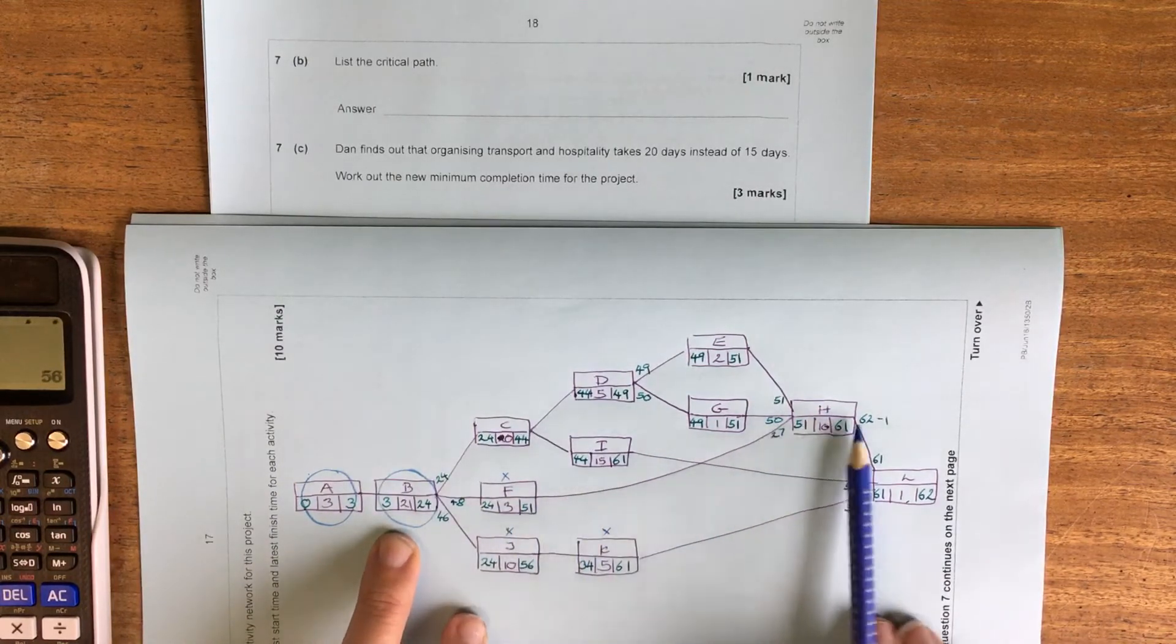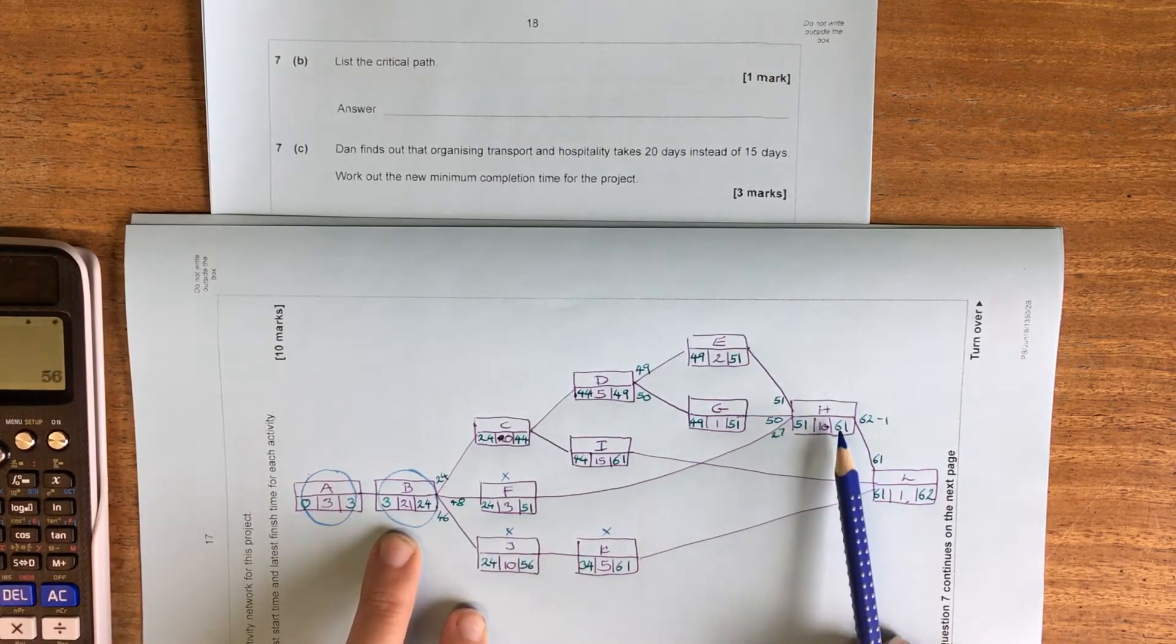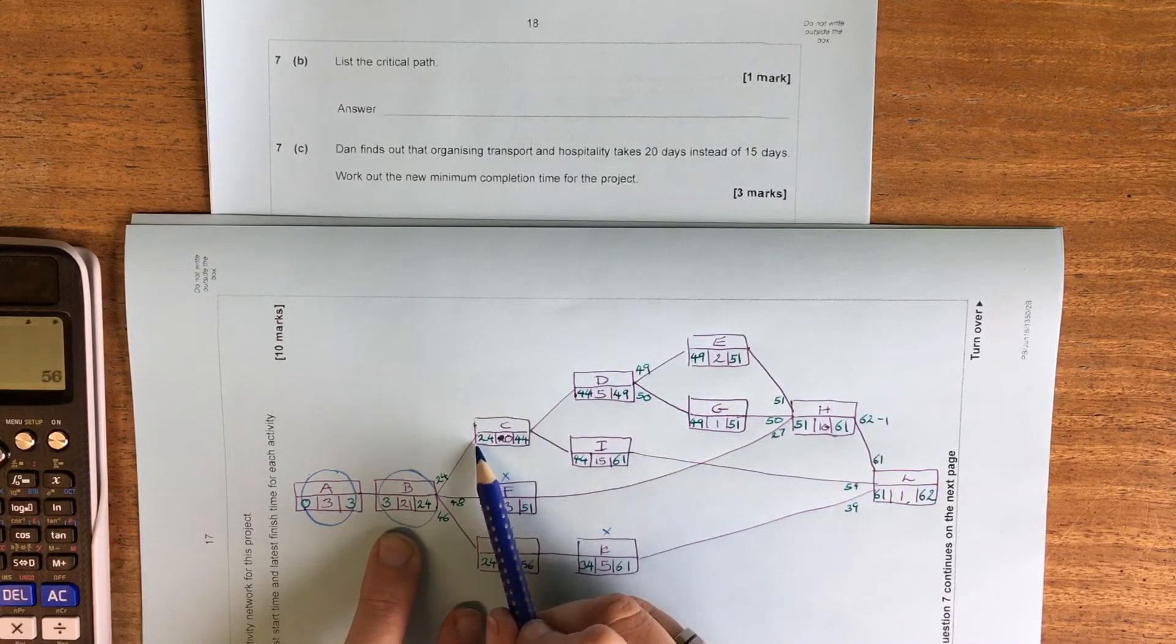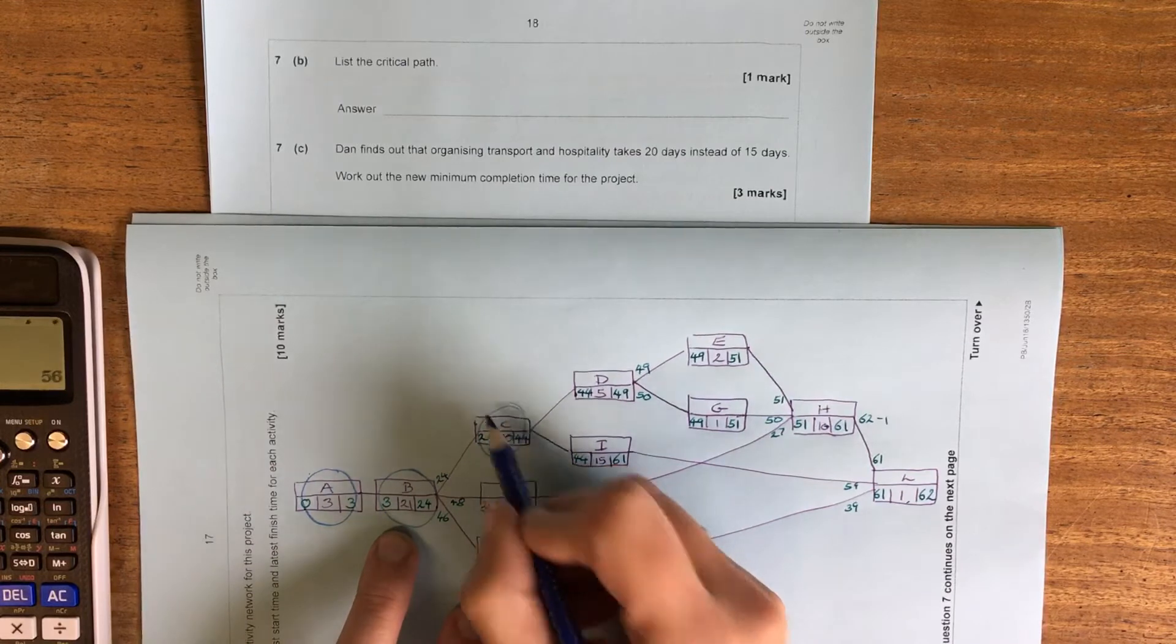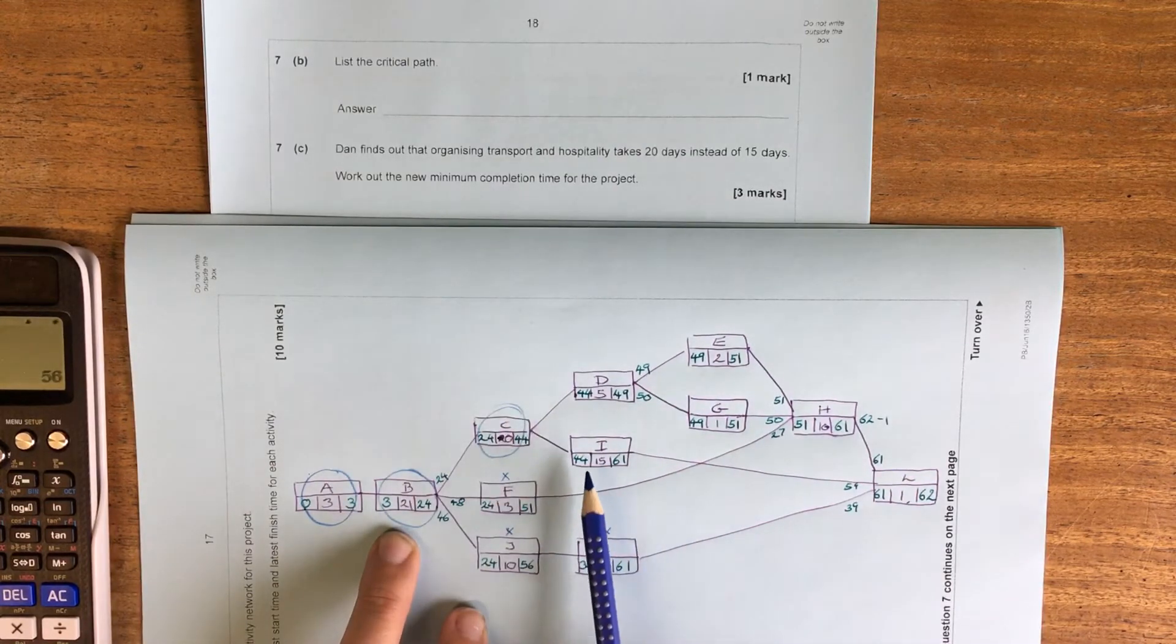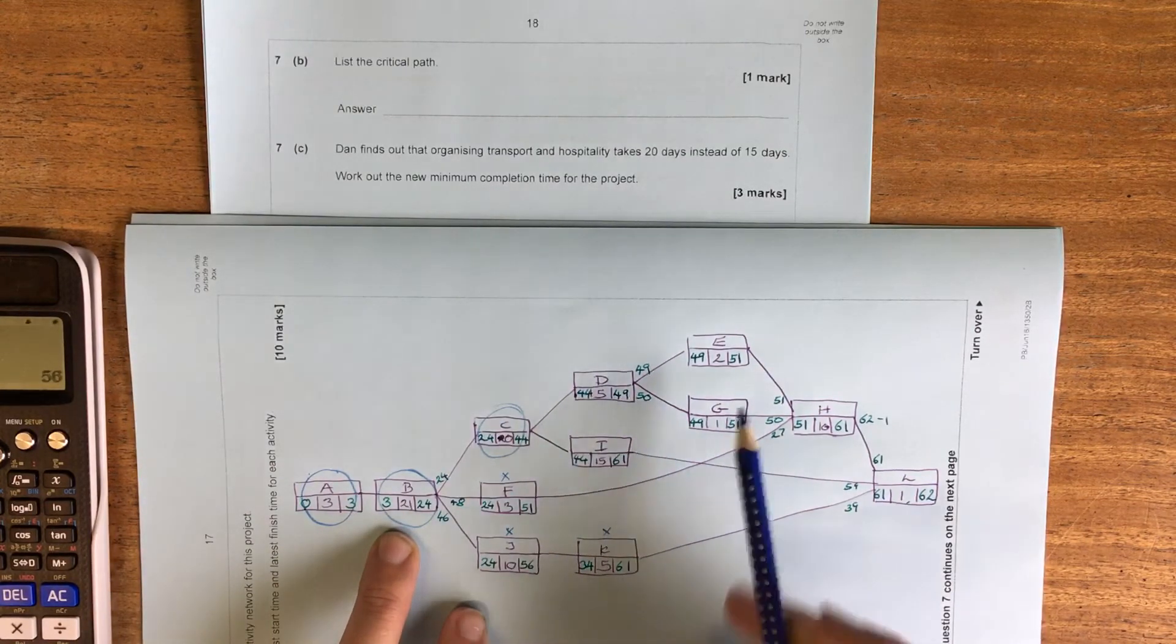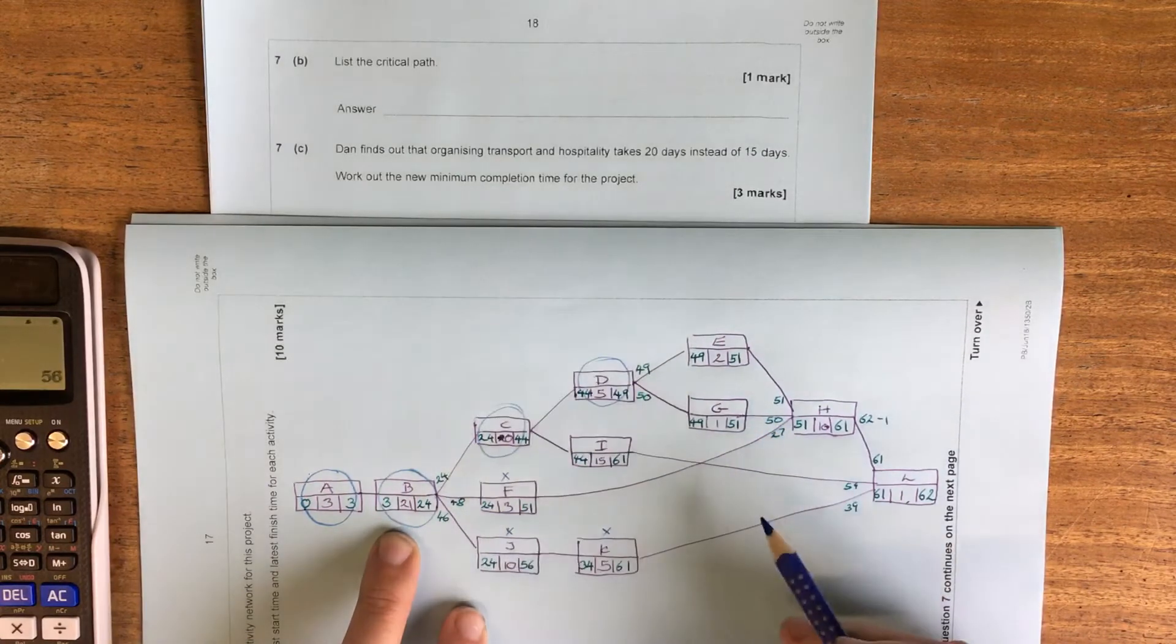The next one on this branch has got other things going into it so we need to double check that. So 24 and 20 gives us 44. So this one's critical. 44 and 5 give us 49. So this one's critical.